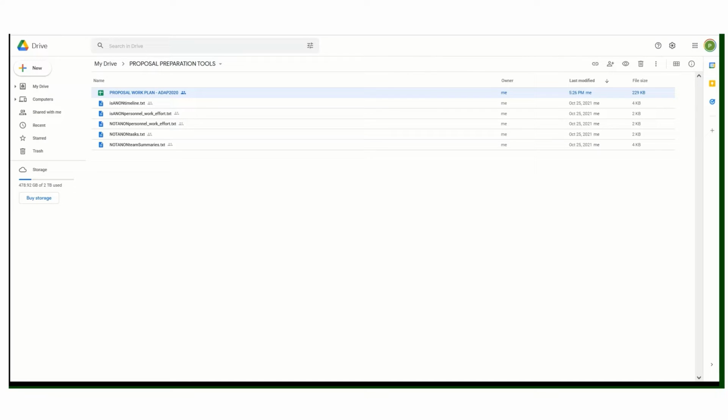The result is a proposal tool that allows you to break down a project into its component task categories. And then under each category, you can define as many subtasks as you would like. And then you assign members of your team to those subtasks along with estimates of timelines for starting and completing the subtask, and how many work hours or work weeks for each team member is involved. The program consolidates that information into 5 different tables that will satisfy the dual anonymous requirements for many federal grant funding agencies. The program is a script that is attached to a Google spreadsheet.